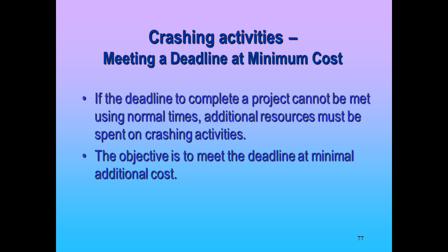But anyway, you have to decide where to spend the money. But if we're trying to meet a deadline, where does that go? Does that go in our objective, or does that go in my constraints? If I need to meet a deadline, it's a constraint, right? Subject to done before 12/31/99. And the objective then is, we have to adhere to this, so minimize the cost, right?